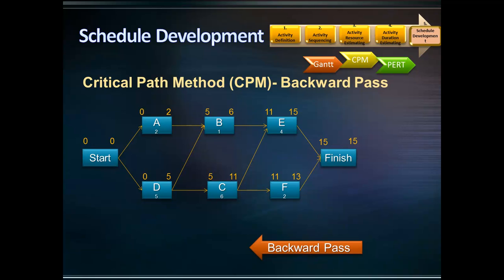Now let's examine the backward pass. For the backward pass, we start from the finish milestone, change the direction of arrows, and move backwards. In this example, the latest finish date for the finish milestone is 15 days. Moving backwards, the latest finish date of activity F is 15 days. The late finish date for activity E is also 15 days. The late start for activity E is 15 days minus its duration of 4, which equals 11 days. Following the same calculation, the late start for activity F is 13 days.